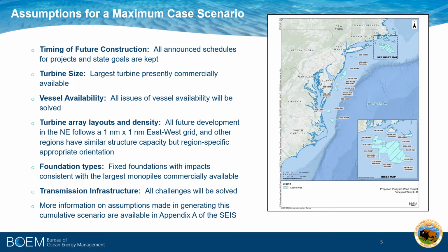Some of these maximum impact case assumptions are listed here. BOEM assumed that all announced project schedules and state goals are kept. In other words, BOEM assumes the most rapid build-out scenario. If schedules experience delays for any reason, development will occur more slowly than is considered here, and impacts related to timing, footprint over time, and concurrent construction will be less than considered in this scenario.